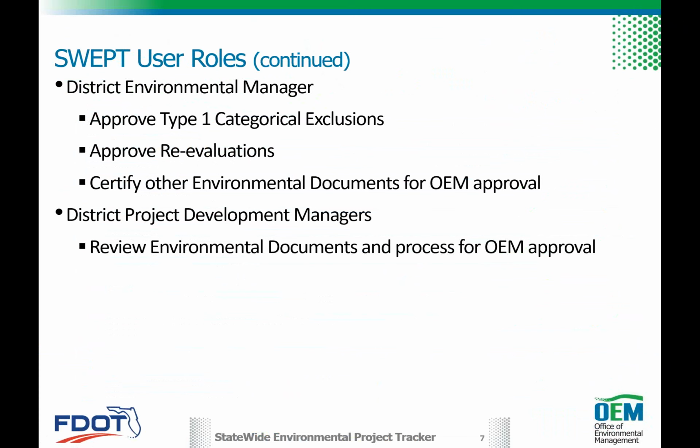If through discussions with the PDC, the project delivery coordinator, there's low risk, maybe you just finished the environmental document and now you're quickly going into design, and there hasn't been much time lapse between the two and there hasn't really been much change, or maybe it's just the nature of the project is very low risk, it's determined that it can be completed at the district level through a consultative process. Then that review and approval occurs by the district environmental manager on that reevaluation, and we'll go through the form and show you guys how that works.